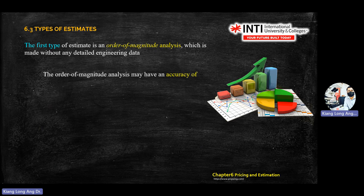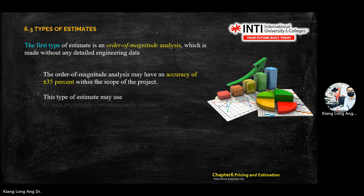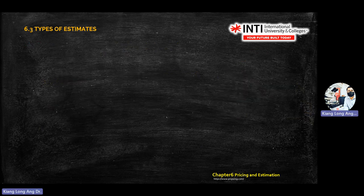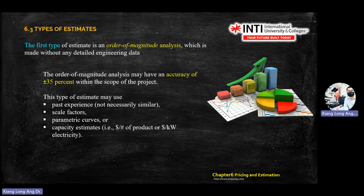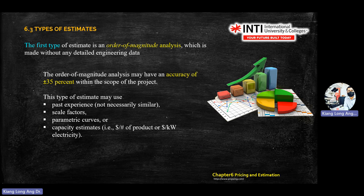The first type of estimate is order of magnitude analysis, made without detailed engineering data. If you use order of magnitude analysis, the accuracy will be around plus or minus 35%. These are typical examples for order of magnitude analysis: past experience, scale factor, parametric curve, or capacity estimates using statistics — you estimate based on previous data.